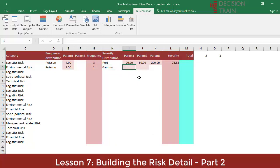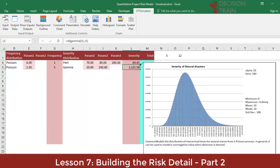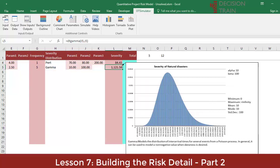Admissibly, for a distribution like this, a statistical work with available historical information would be required. We use it here for demonstration purposes only. Insert your first alpha parameter of 10 into I5 and your second beta parameter of 100 into J5. The gamma is a function that models the distribution of inter-arrival times for various events in a Poisson-type process. It is also widely used in meteorology to quantify events such as precipitation.